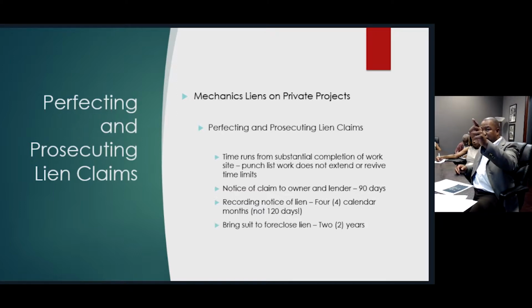Again, I look at the 90-day timeline from substantial completion. You've got to get a notice to the owner and the lenders. And then you have 4 calendar months to file notice of your lien. Notice I did not say 120 days. It is 4 calendar months.